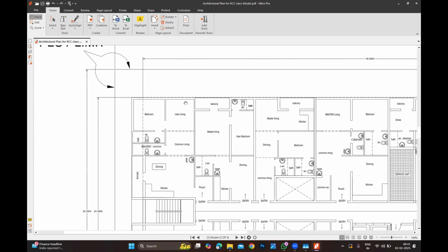Because it happens. The reason is that they brought it almost to the detailed design with a lack of experience from the structural engineer involved in the project. How can you go back and change the architecture? You cannot change it, because the client has approved and the architectural preliminary drawings are approved. The project is in Abu Dhabi. Now Abu Dhabi submission is a bit different. In Abu Dhabi, you need to submit the schematic design to the authority for approval.